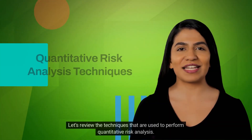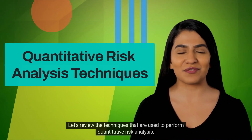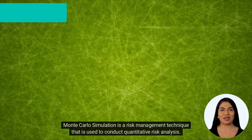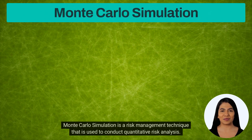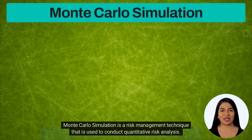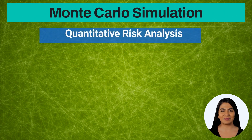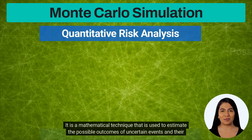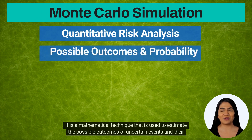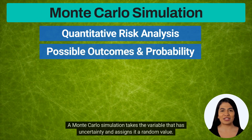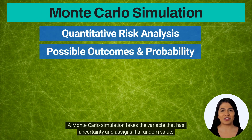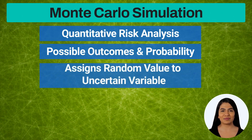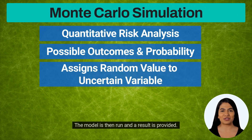Let's review the techniques that are used to perform quantitative risk analysis. Monte Carlo simulation is a risk management technique used to conduct quantitative risk analysis. It is a mathematical technique used to estimate the possible outcomes of uncertain events and their probabilities. A Monte Carlo simulation takes the variable that has uncertainty and assigns it a random value. The model is then run and a result is provided.